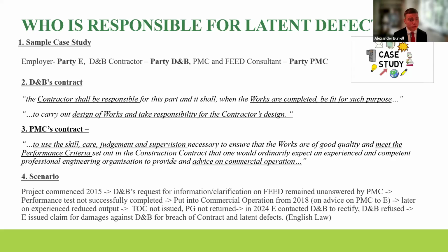In relation to a tort or negligence claim, there is a separate period. It's either 6 years from the cause of action, which would be practical completion, or 3 years from the earliest date on which the prospective claimant had the knowledge for bringing the claim and the right to do so. The knowledge for bringing the claim concerns knowledge of the fact of the damage and knowledge that it was attributable to the act or omission alleged to constitute the negligence.